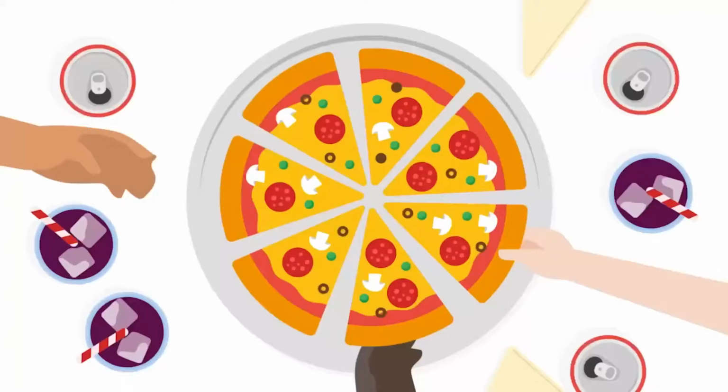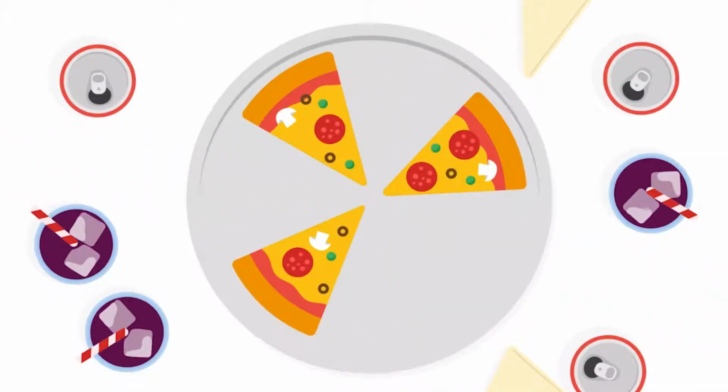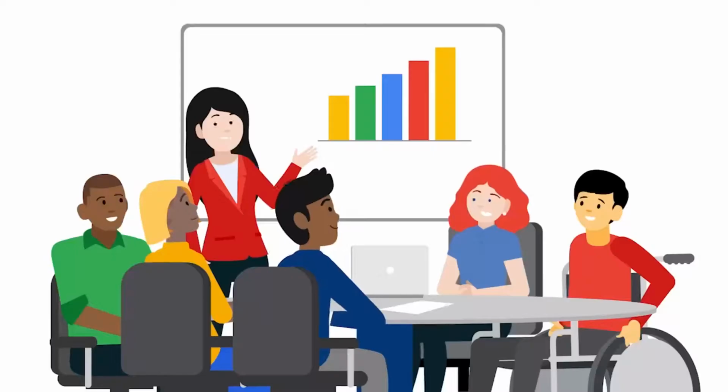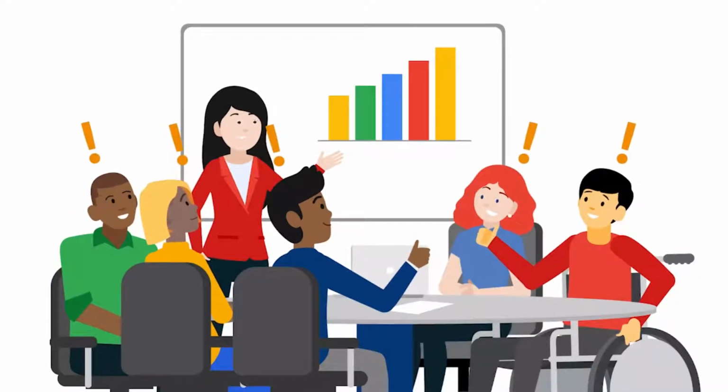Scrum lends itself best to the following types of projects and teams. Ideally, a Scrum team should be cross-functional, with around 3 to 9 team members. Some call this a pizza-sized team, because it has the same amount of people who could share a large pizza. If the team is too small, you might not have the diversity of skills to get work done. If the team is too large, it gets hard to distribute information. Lastly, Scrum works best for projects where the team and management are open-minded, adaptable, and value continuously learning how to be a better team. Trying to force a team to do Scrum will almost always fail.